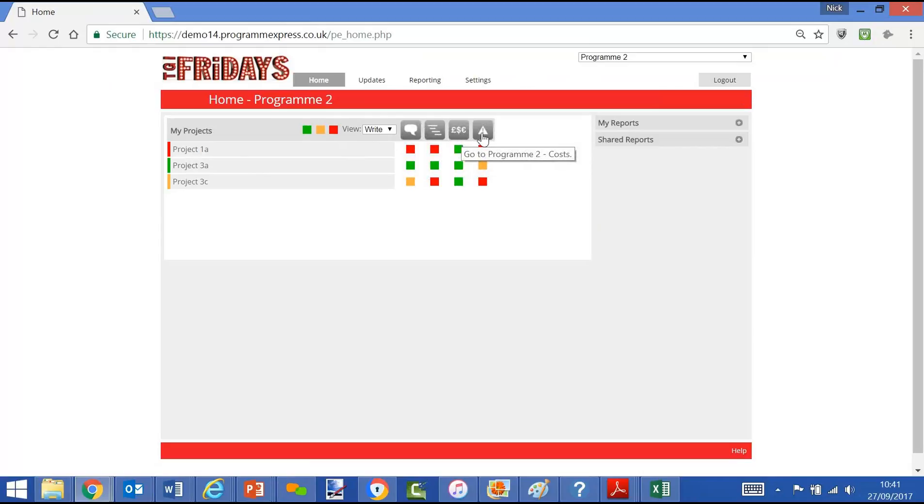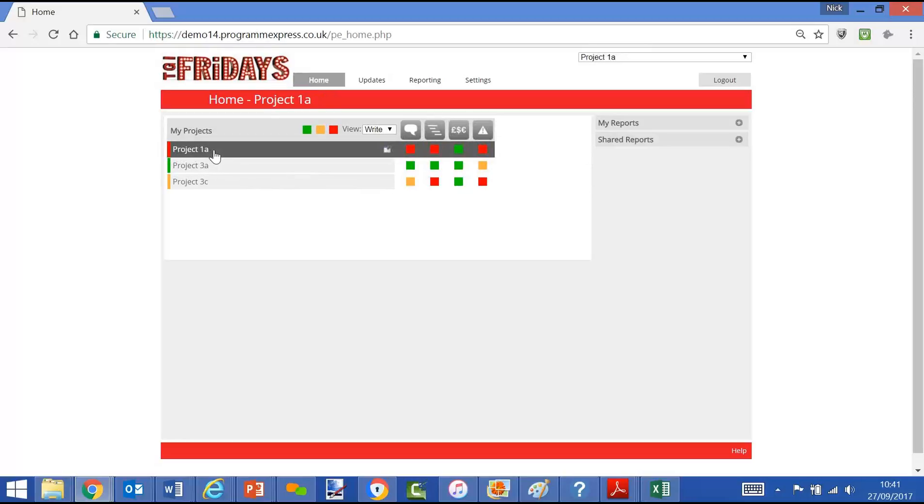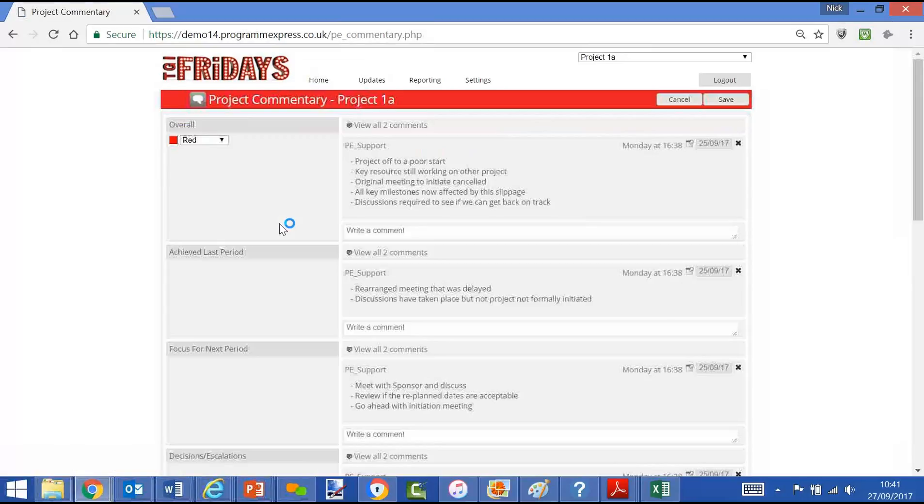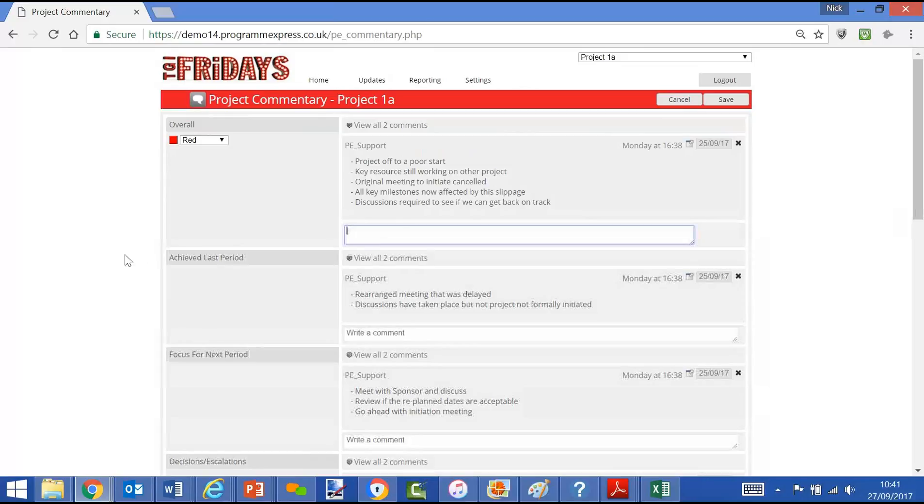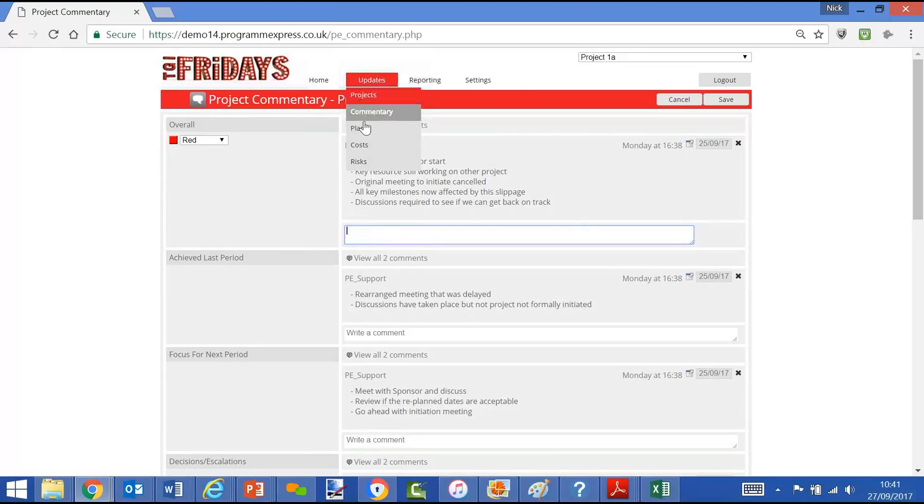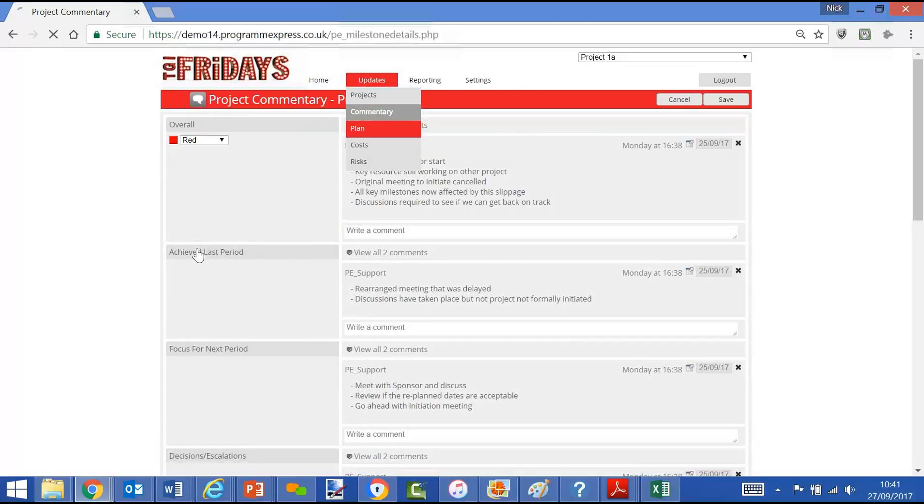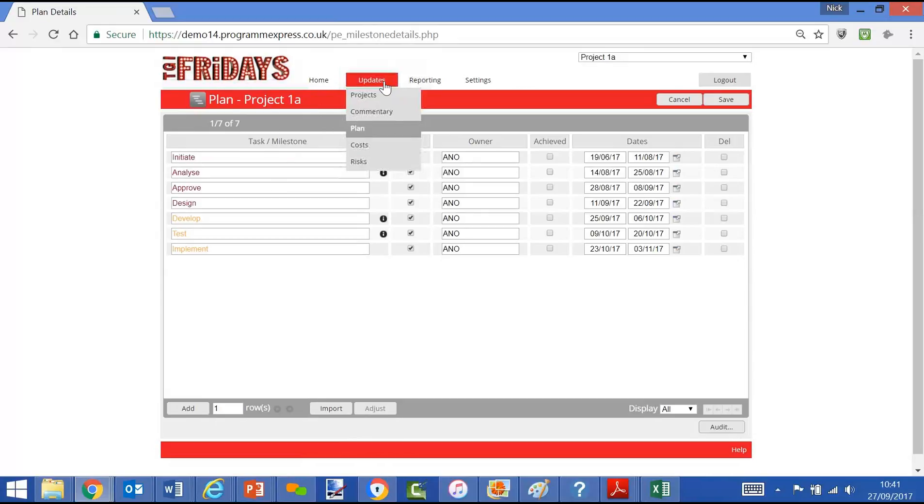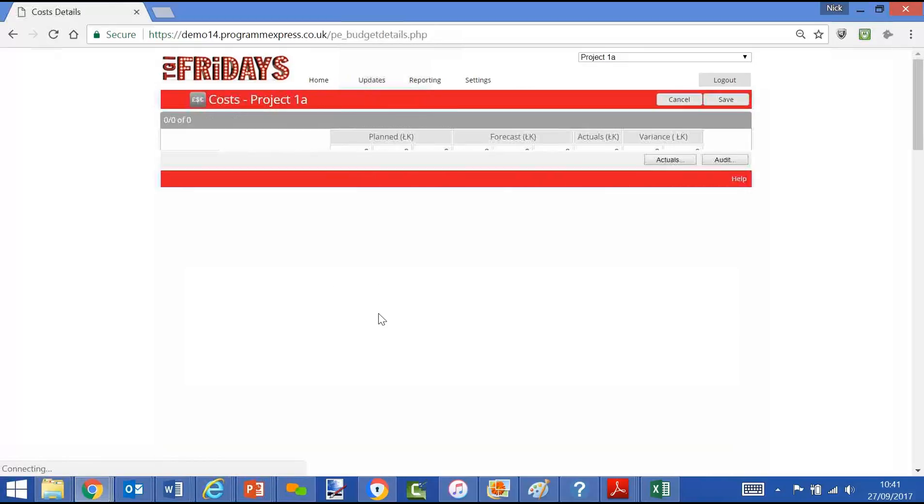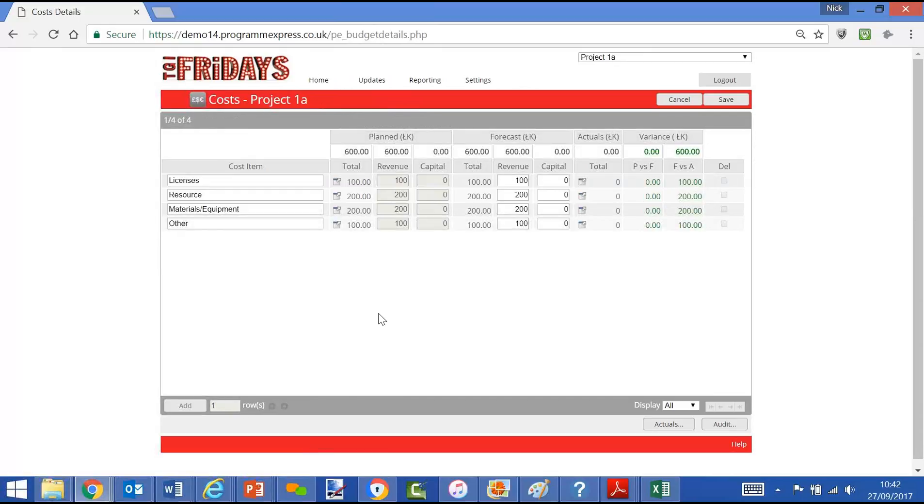As a project manager, I'll be expected to click on the commentary, see what I said last time, make an update, move on to the plan screen, have a look at the plan, see if any changes need to be made, move on to the cost screen, have a look at the budget information, update our latest forecast against the plan.